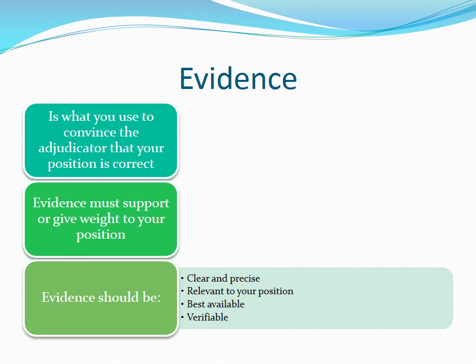Your evidence would be the attached copy of the duly signed contract to which you would refer the adjudicator to clause 14. Not all evidence is regarded as being of the same value or strength. For example, an audio recording of a meeting where you claimed the respondent agreed to the additional work you are now claiming payment for would be more persuasive than a note in your diary of the meeting.